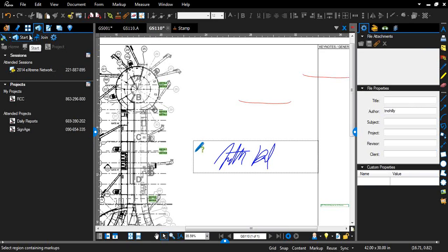And then they also have project sessions, which are a little bit different. They allow you to set up different documents, and only one person at a time can go into those documents. You essentially take them offline. And those are really good for punch lists. At the airport, we had another big project. We had thousands and thousands of punch lists, and so this was able to expedite it and help the process. So I'll show you how to kind of set that up.